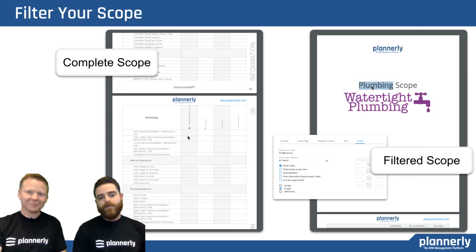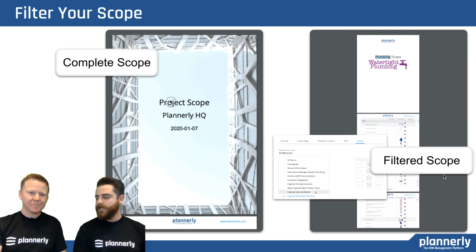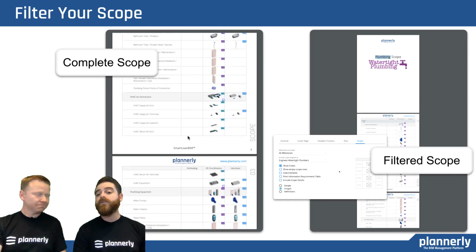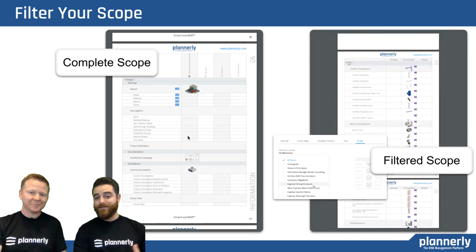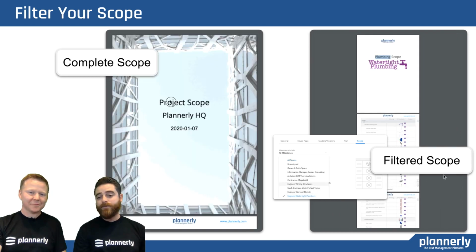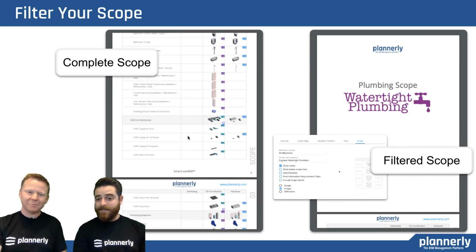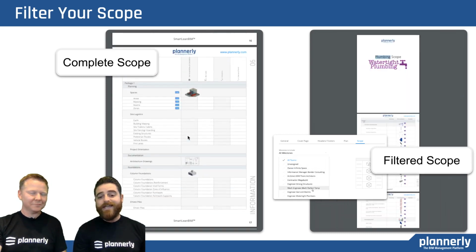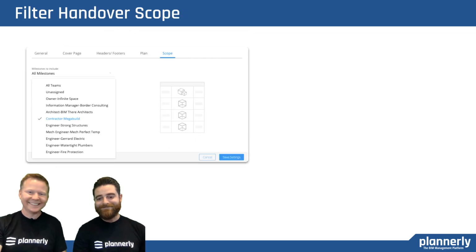Yeah, and one of the most common challenges we found from others is that contracting a BIM execution plan has been difficult. That's mainly because it contains information of others that people might be afraid to sign on to, because there's so much overlap and things like that. But if you can provide a very lean and detailed scope of what they're responsible for, they're more likely to get engaged and actually complete the project with you. That would be nice. Yeah.